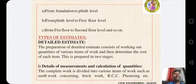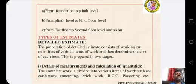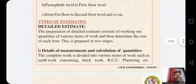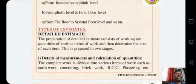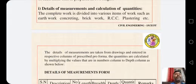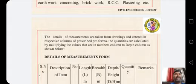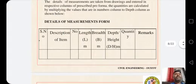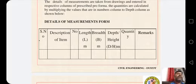Types of Estimates: Detailed Estimates. The preparation of a detailed estimate consists of working out quantities of various items of work and then determining the cost of each item. This is prepared in two stages: details of measurements and calculation of quantities. The complete work is divided into various items such as earthwork, concreting, brickwork, RCC, plastering etc. The details of measurements are taken from drawings and entered in respective columns. Quantities are calculated by multiplying the values in number, length, breadth and depth. The detailed estimation tabular column includes: serial number, description of items, numbers, length, breadth, depth, quantity, and remark.